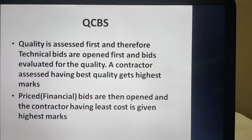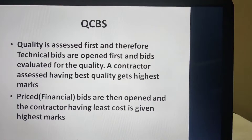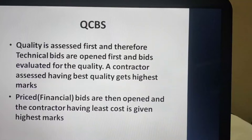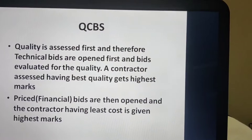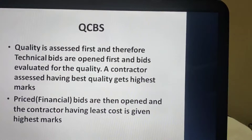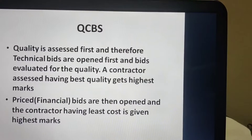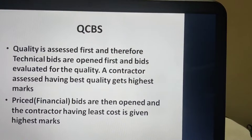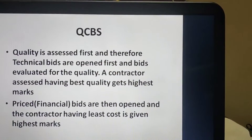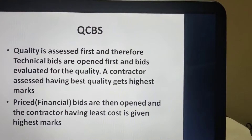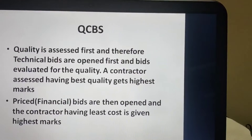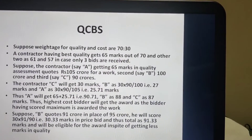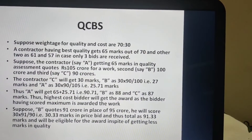Technical bids are opened first and then bids are evaluated for quality. A contractor assessed as having the best quality gets the highest marks. When financial bids are opened, the contractor having the least cost is given the highest mark. Both marks are added and whoever achieves the maximum marks is considered for award of the work. Suppose weightage for quality and cost is 70 to 30.